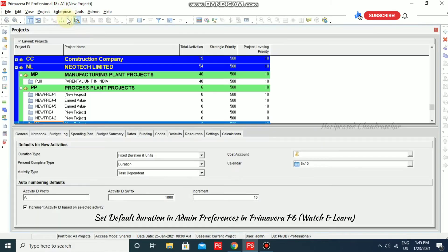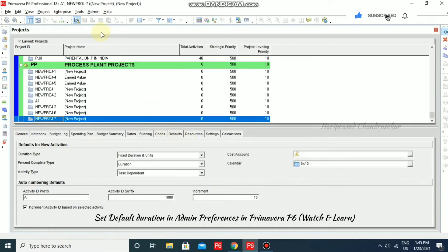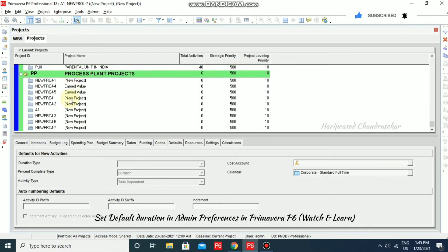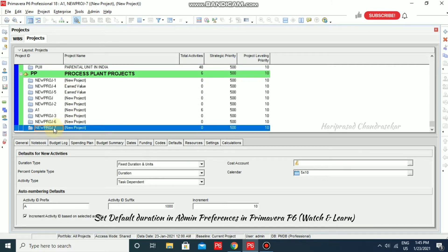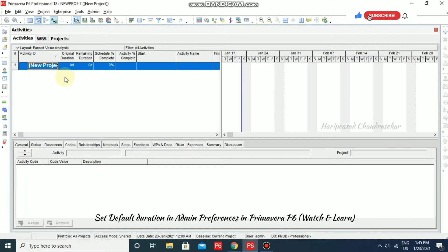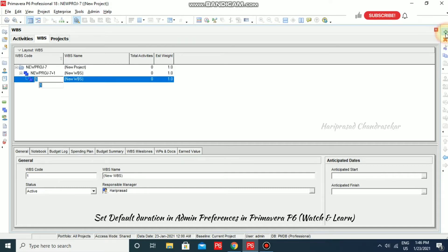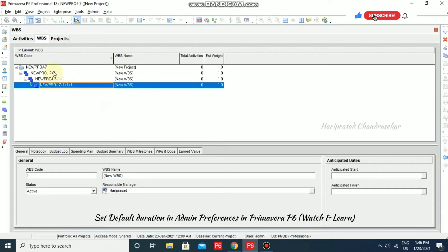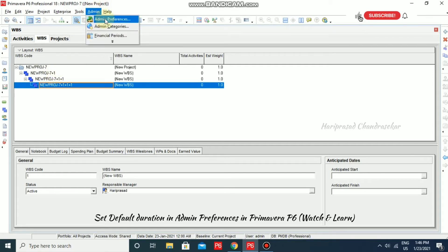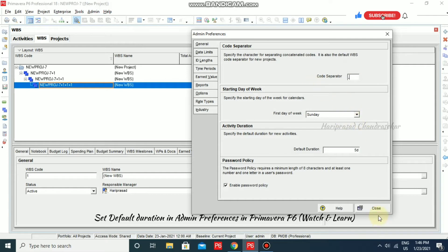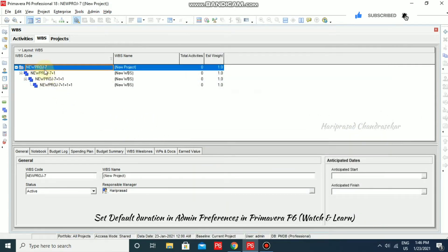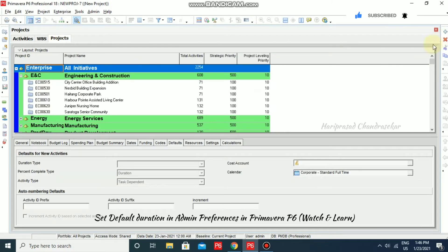Going to Enterprise Projects and creating a new project, I'll create a WBS for it. Once you open the new project and go to WBS, you can see that the code separator is now plus. This is applicable only to new projects — it won't update old projects. If we change it back to dot and close, existing projects remain unchanged.